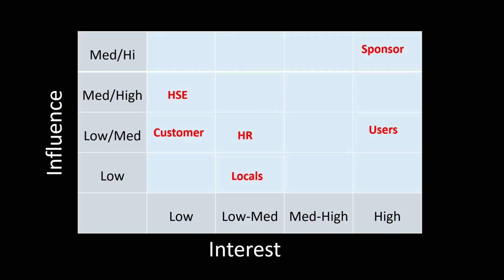They need to make sure that we're treating those individuals and staff correctly, as well as supporting us with resourcing specialists, maybe contracts if we're bringing people in, companies in from the outside. And also, because they're HR and they're about legal compliance, they've probably got a pretty good amount of influence over our project. They could affect our timelines by insisting that we use particular protocols and strategies when we're hiring or doing overtime or whatever that may be.